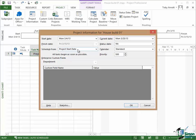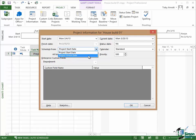But there is another option and if you click on this one, the other option is Project Finish Date and there are some projects where your objective is not to start now and finish as soon as possible but to start as late as possible with the objective of finishing on or by a particular date. So for example, supposing that you were planning a wedding or supposing that at work you were planning a big event, maybe a company meeting, maybe an announcement to the press. Your objective would be to finish by a certain date, not to start on a certain date. And in that case, the point I made about making absolutely sure that your start date is right would become equally important for your finish date.